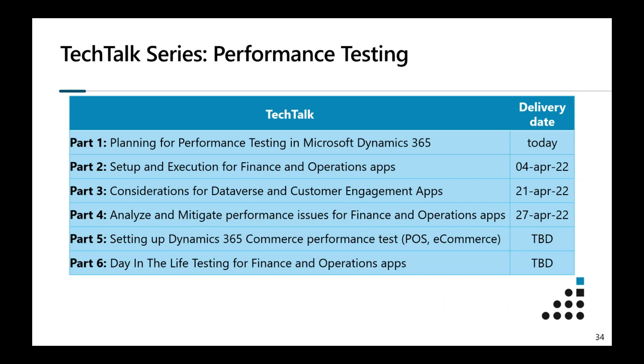I see. Another question we had was, do you recommend to run performance tests prior to sign off of standard application updates, even when you have no additional customization added? I mean, the recommendation is to do performance testing definitely before each new phase of the project or rollout, correct? So if the load doesn't change drastically or your volumes will not go up drastically and you do an update, then what we highly recommend and should be mandatory is regression testing, correct?